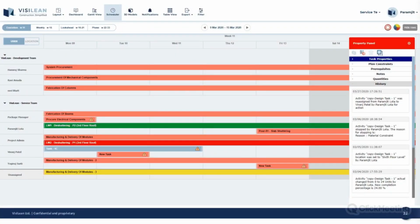So at the moment, the majority of people use manual sticky notes. They write out a sticky note for a task. They put it under the day or date they think it's going to work on. Now, the problem with that when we go to site is no one really takes responsibility for that task or action. If something changes, they just move the sticky note along. Nothing's been recorded as to why that change happened. If you can digitize that whole history, that whole action, everything can be logged, and you know who was responsible and why it was changed. So at the end of the project, you can again evaluate.